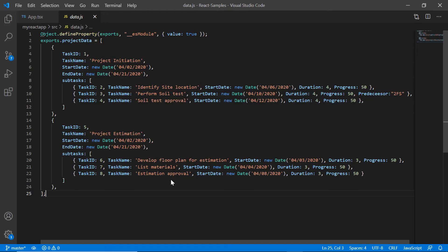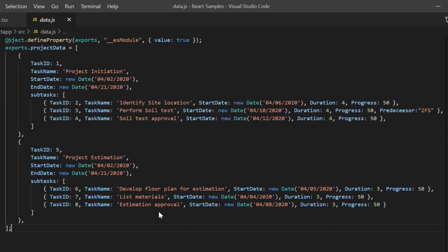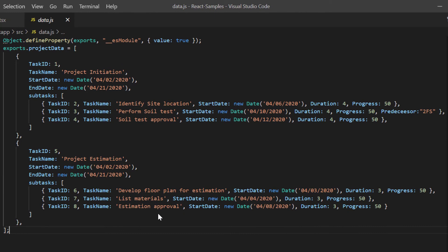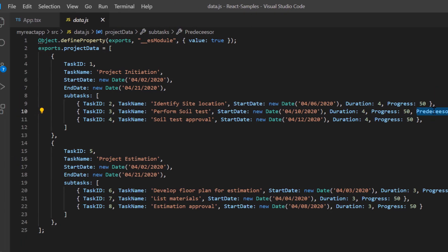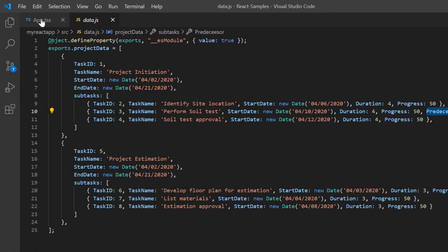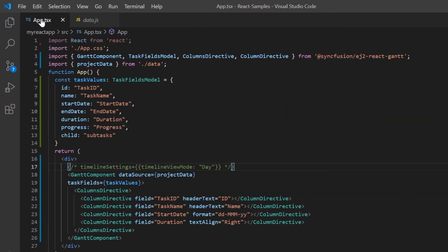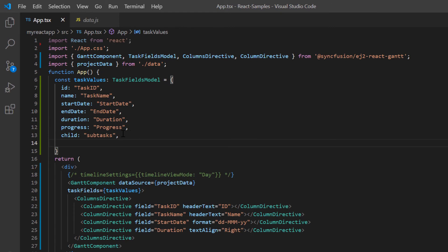In data.js file, notice that the task 3 predecessor is set to finish to start with task 2. In the app.tsx file, I add the dependency property in the task field settings and set its value to predecessor.